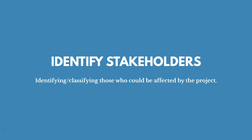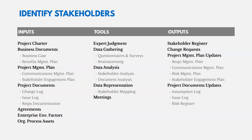Identifying stakeholders means identifying and classifying those who could be affected by the project. The inputs include the project charter, which may identify some stakeholders, as well as business documentation like a business case and a benefits management plan. Those may include information about our stakeholders. In the project management plan, you'll see a communications management plan and a stakeholder engagement plan. We can also have project documents and agreements like contracts or statements of work that could include stakeholder details.